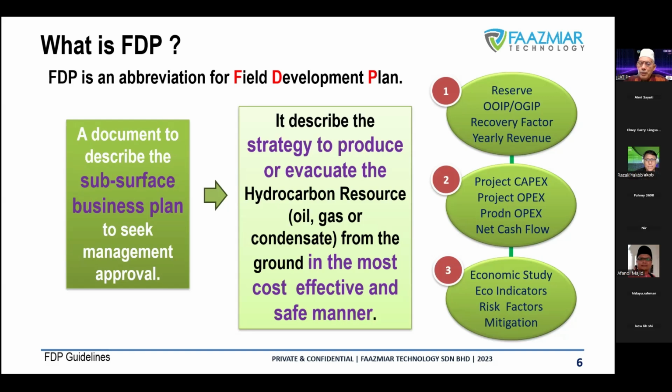Okay, the economic study is all covered in terms of the study. It is going to be quite difficult for the economics because you are talking about so many variables and so much uncertainty, so you have to really judge the economics itself. Most costing will be done on the basis of P10, P50, P80. So there are three levels. P10 is based on the best result that you can have.